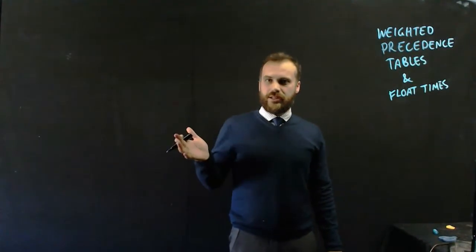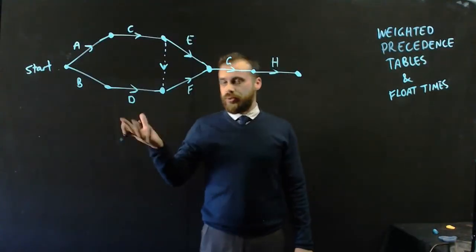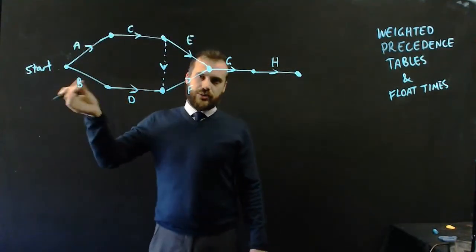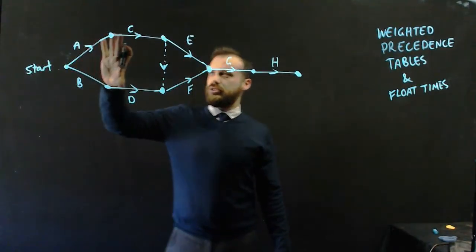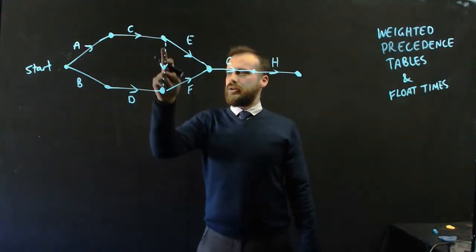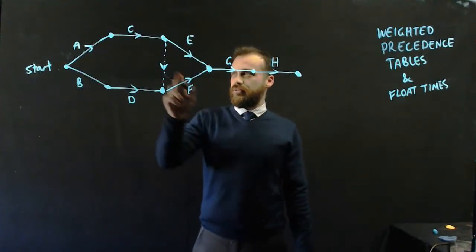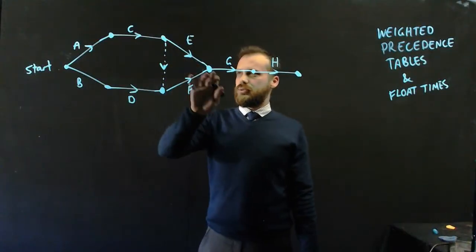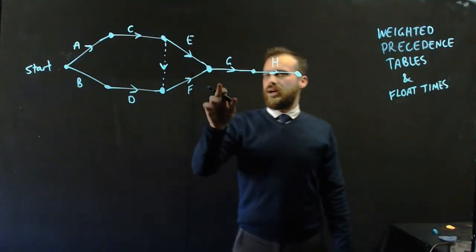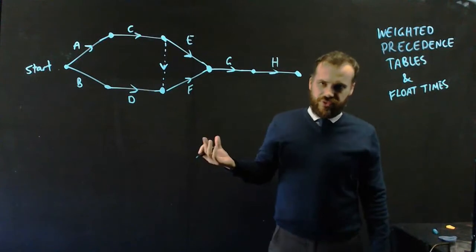First of all, we're going to need a network, and this is the activity network that we're going to use. How does it work? Well, you can do A and B, you can start off with those, then you can do C and D. Now, you can't start F until C is done, that's what that dummy activity is there for. You can start doing E as soon as C is done, and then G, and then H, and then you're finished.